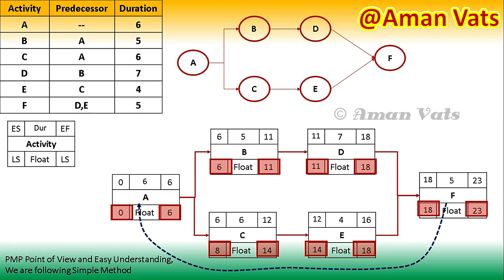Using the backward pass method to calculate late start and late finish: since the early finish is 23, the late finish is also 23 — that remains the same. Now what we do is subtract the activity duration from the late finish to get the late start. So 23 minus 5 equals 18.